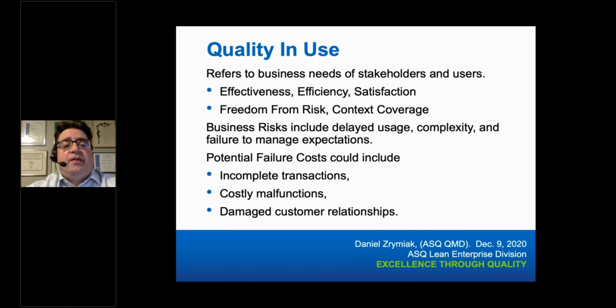So if the software is not suitable, it won't be used. And if it's not used, then that deployment is delayed. If it's excessively complex, so coming back to the enterprise resource system, if someone, let's say a purchasing agent, who used to just get a post-it note and make a phone call to the supplier saying, yeah, we need 100 more units, that's the manual approach. If using the software is more complex, they will simply disregard it and continue using their old manual method. So, which then negates the effectiveness of the solution.